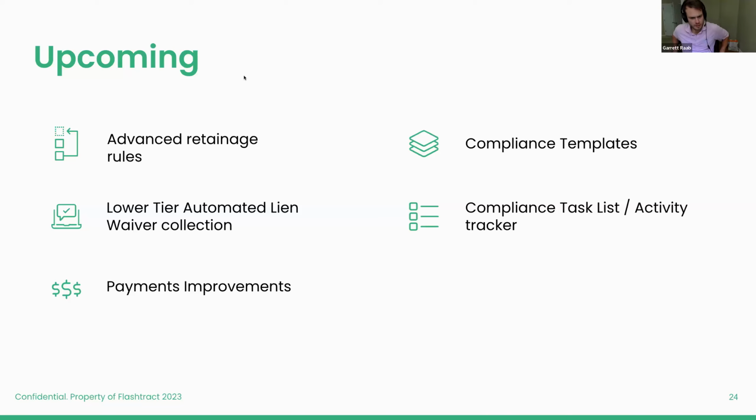Awesome. Thanks, Sam. So I'll go ahead and pick up over here on the left-hand side. We'll start with advanced retainage rules. So this may or may not be applicable to everybody, but oftentimes based on what states you're doing work in and different statutory laws, there may be certain requirements around how much retainage has to be held and when, that you have to abide by as the general contractor.